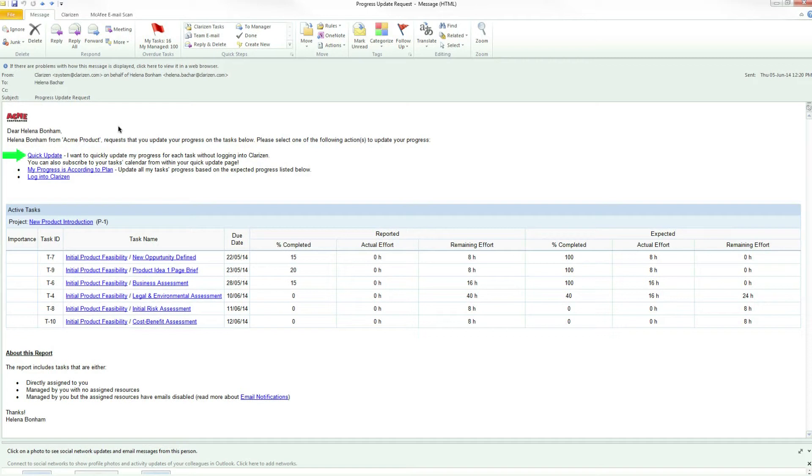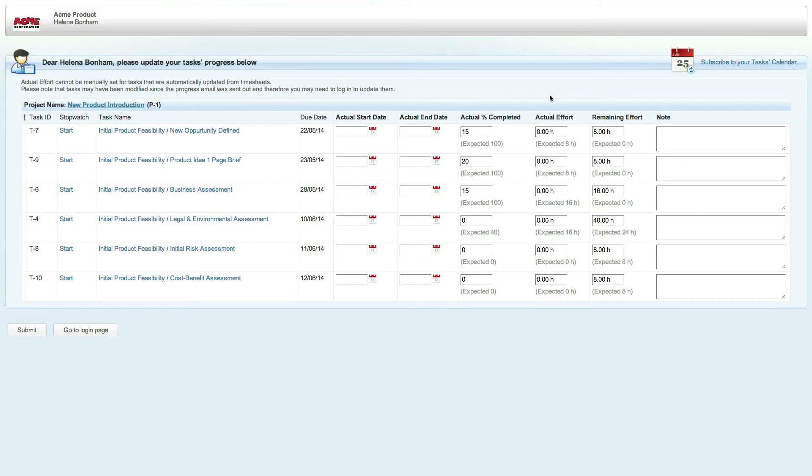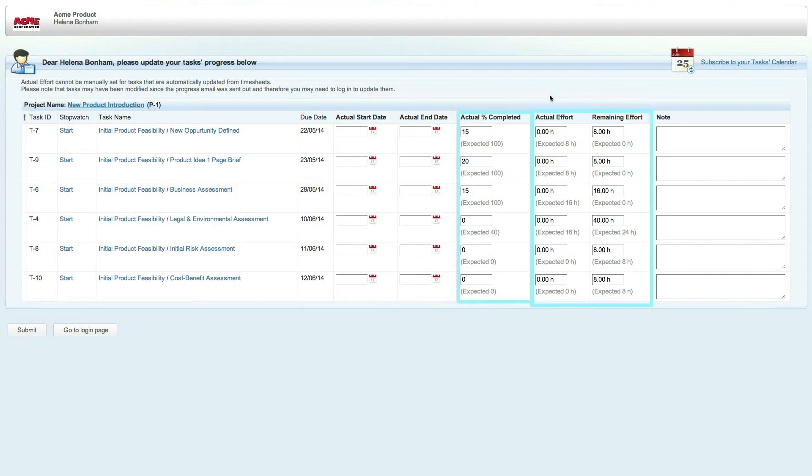Clicking on this link will open a browser window which lists all of the reportable tasks that you are assigned to. You can now enter your percent of completion or the actual and remaining effort on each work item.